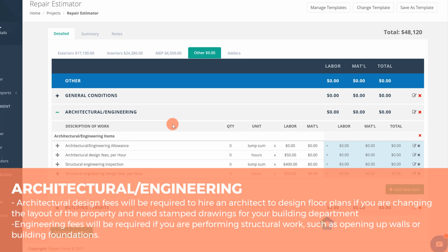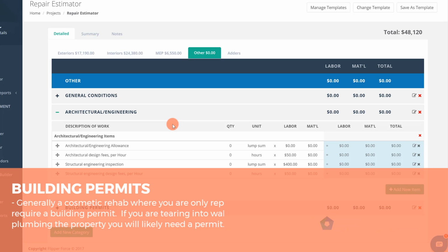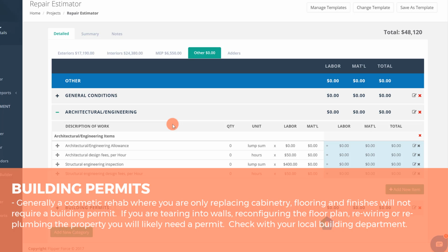As far as permits, pulling building permits, the only permit that we'll really need is going to be the electrical permit. So since we're keeping everything in the exact same location, we're really just replacing plumbing fixtures. So in our area, you don't have to actually pull a permit for replacing a plumbing fixture in the exact same location.